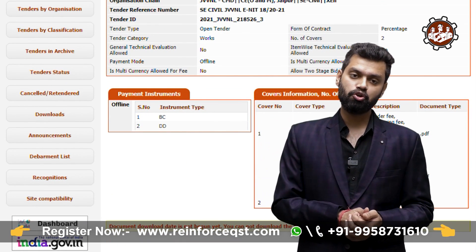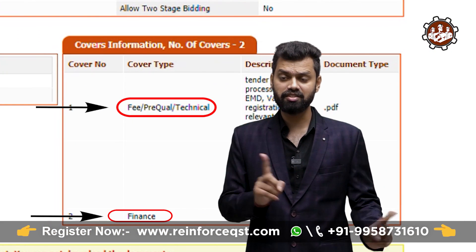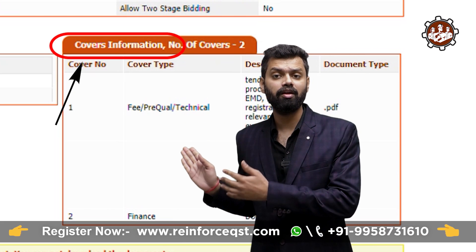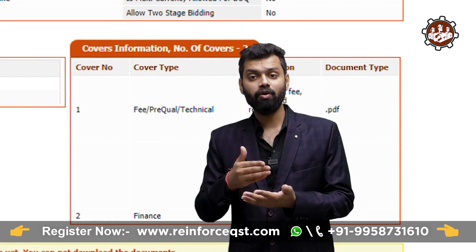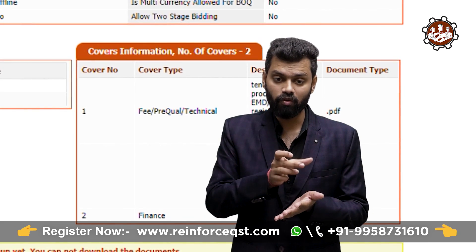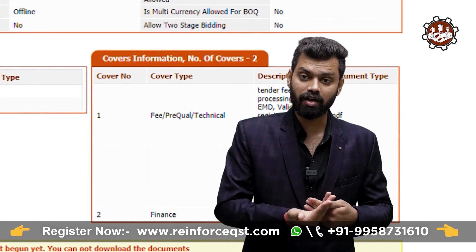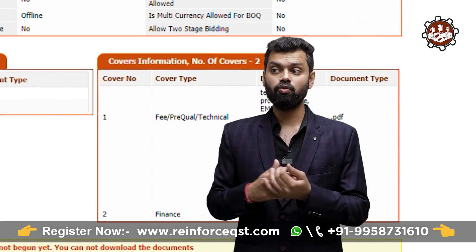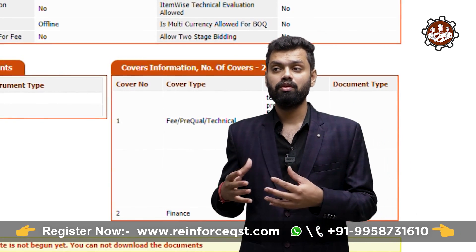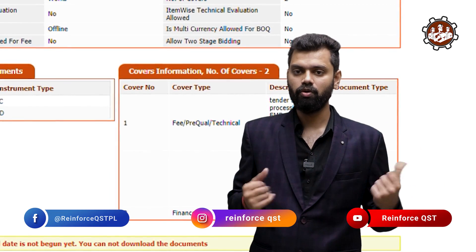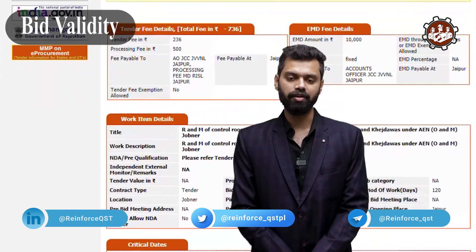Cover information generally comprises two types: technical cover and financial cover. The technical cover contains all technical requirements from the client for participating in the tender — for example, minimum turnover (e.g., 5 crore), bank guarantee, performance guarantee, and details of machinery, tools, equipment, and plants. The financial cover means you bid the tender against the client's BOQ. So there are two covers: first is technical, second is financial.